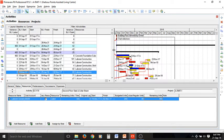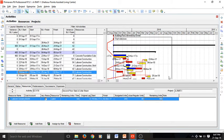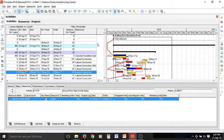After scheduling, we can now see some slippage or variance for our activities. This is the progress line — you can turn it off or on. If it is to the left side of the blue vertical line, which is the data date, it shows that we have some delays. If it is to the right part, it shows good progress and we are ahead of schedule.